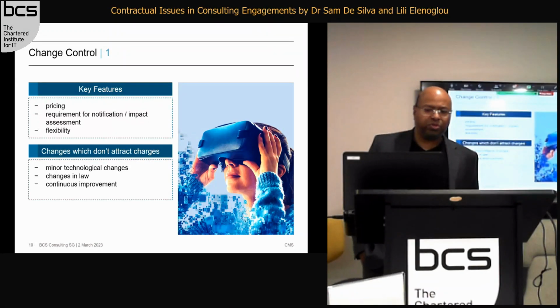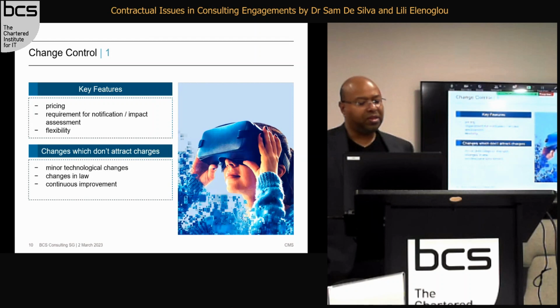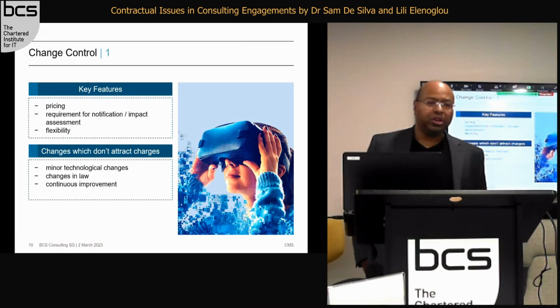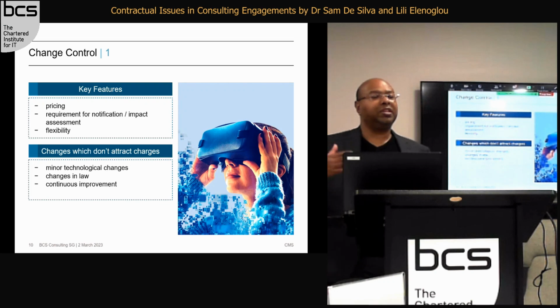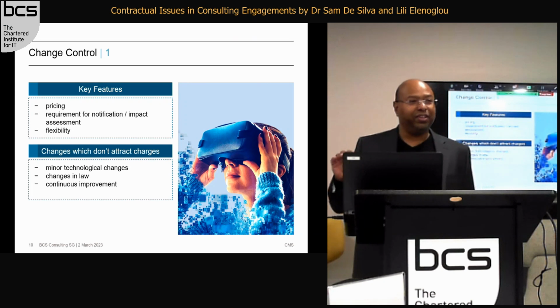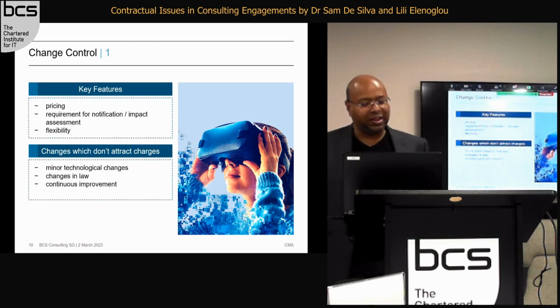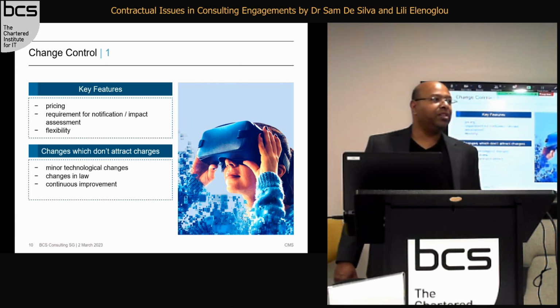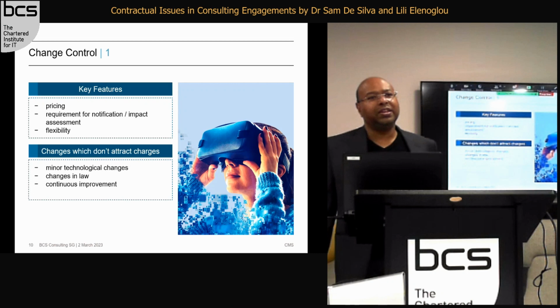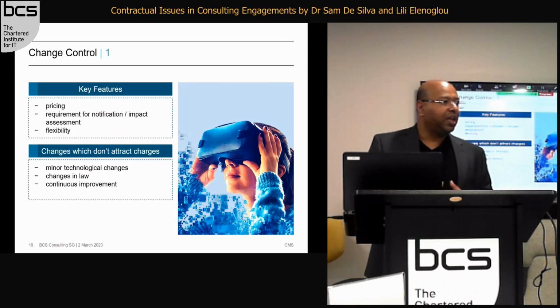Often customers will say there are specific changes that don't attract charges. They may say minor technological changes, changes in law, or continuous improvement. Now, obviously, the bigger the list here, the worse it is for you as a consultant. So you want to try to make that list nothing, so basically everything you can charge for. I think the main one that gets quite contentious is changes in law. Often, particularly in a regulated environment where you're creating a piece of software, they will say, look, if there's a change in law, you will need to make sure that the software complies with that change in law.